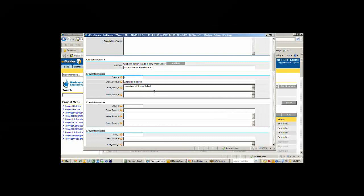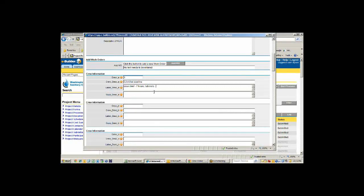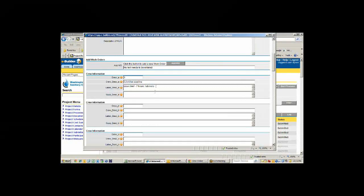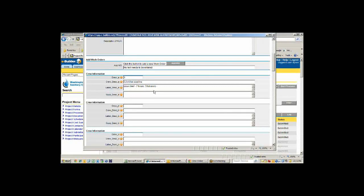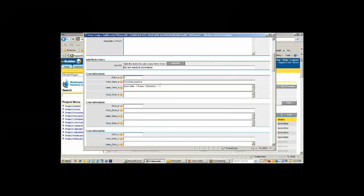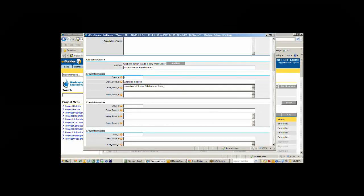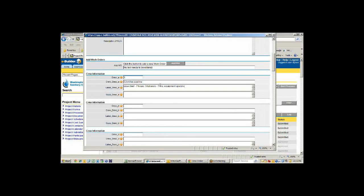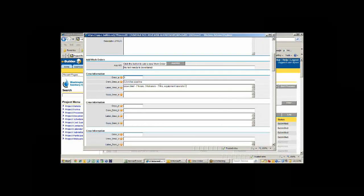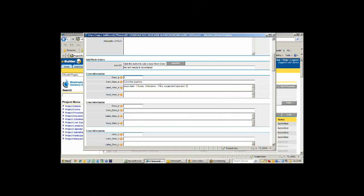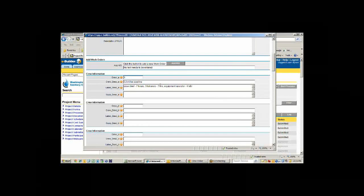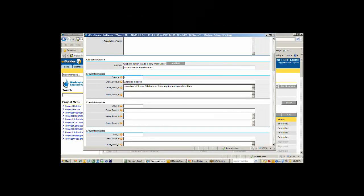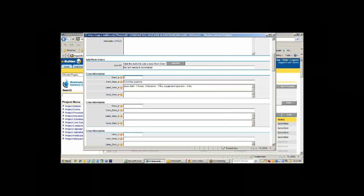They might say they have a crew chief who was there for seven hours, three laborers for seven hours, and an equipment operator for four hours or whatever they're there for. This is important because if we get into a claim situation, we know the contractor can't claim they had 14 dump trucks there when actually they didn't.